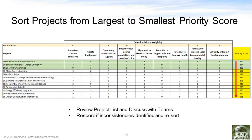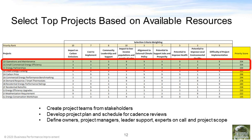What you're looking for is a top list of projects that has broad appeal across all stakeholders due to high scores in the most important categories. Next you will determine how many projects are feasible — we recommend selecting fewer projects than you'd like in order to prioritize that those get done and get fully supported. If we pick the top three projects, we can create a project team from the stakeholder group to support each of those projects. Each project will get a project plan and rough time schedule, and cadence reviews should be established to review progress. The project must also define who the owner or owners are, if there will be a project manager function, who the leaders are supporting the project, any experts on call, and the project scope.